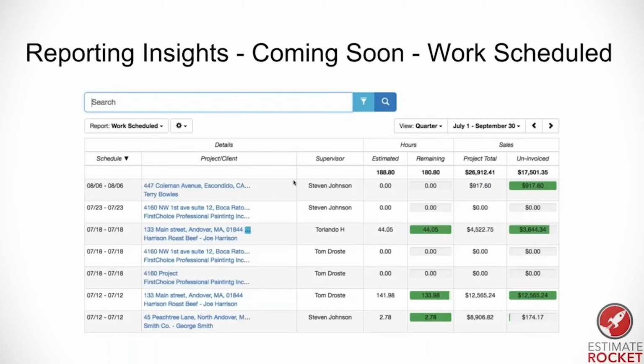This is a new report that I'm pretty excited about. It is coming soon, possibly very soon. And this report is basically a forecast of what's happening for this week, this month, this whatever period, based on projects where the work is currently scheduled. So for example, if you look at this report for a given upcoming week, it will show you hours if you're tracking hours, and it will also show you the project total versus the uninvoiced total. So a lot of people will be able to use this as a future forecast of what they can expect for revenues.